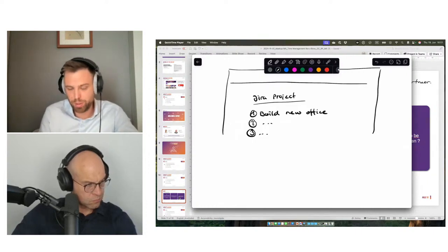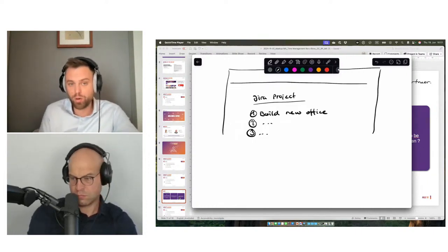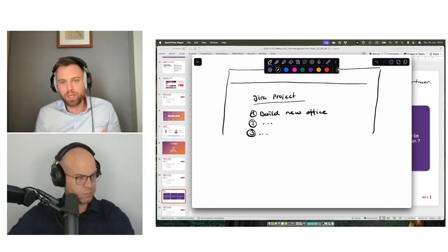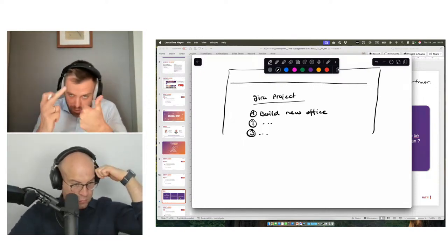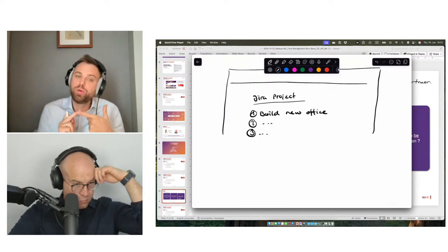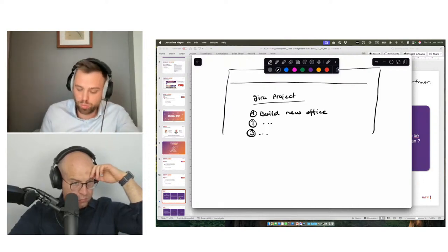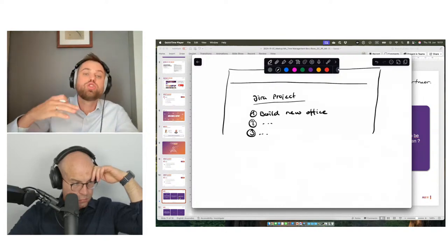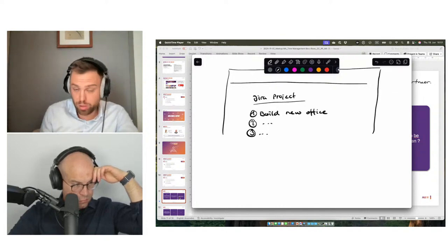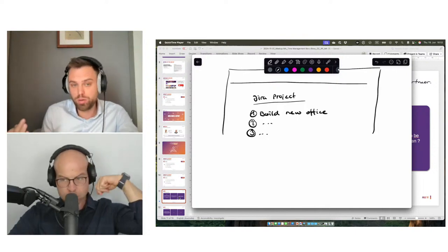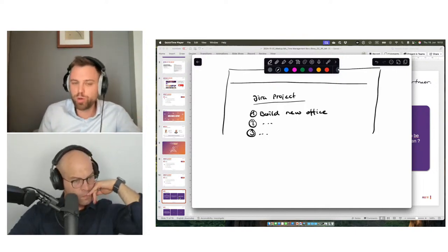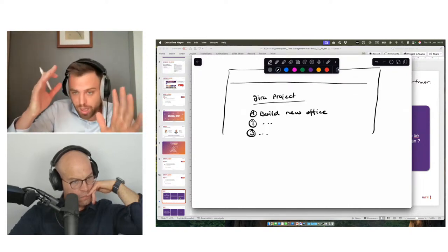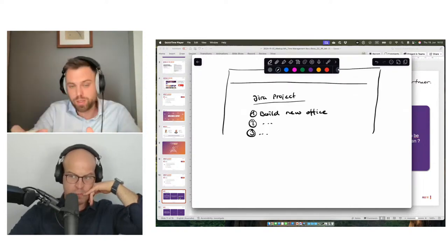And that's important to understand, because what the app does now is it takes this single Jira project and brings it into a portfolio board, as I showed you before, and a portfolio timeline. And that's pretty cool because you don't need to set up some hierarchy and so on. You don't need Jira Premium. You can do it even on a Jira free plan, which is really cool if you're a small team. And it's actually a really good MVP solution to start managing your projects. You can even assign custom fields, if you have a specific budget and so on.